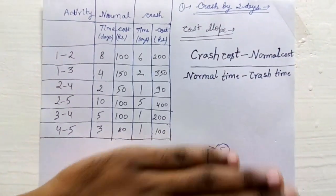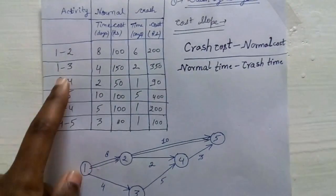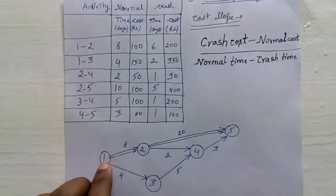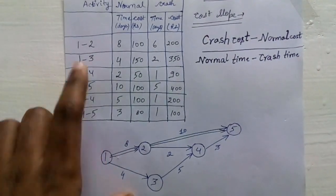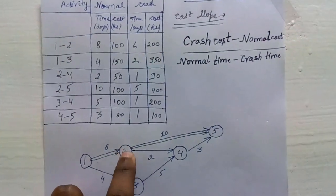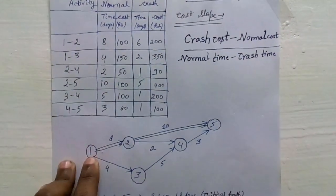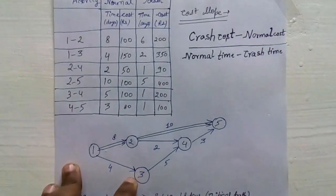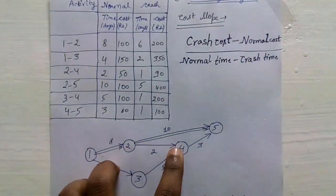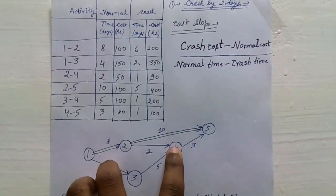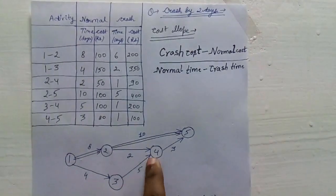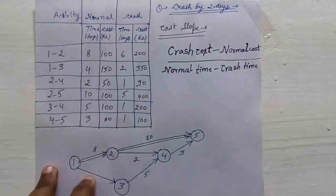To draw the diagram corresponding to these activities, begin with node 1 in a circle. From 1 to 2, put an arrow and mark node 2. From 1 to 3, put another arrow and write 3 in a circle. Then 2 to 4 — draw an arrow from 2 and write 4. Connect 4 to 5 as well. Write the corresponding normal time on each arrow — for 1 to 2 it is 8.